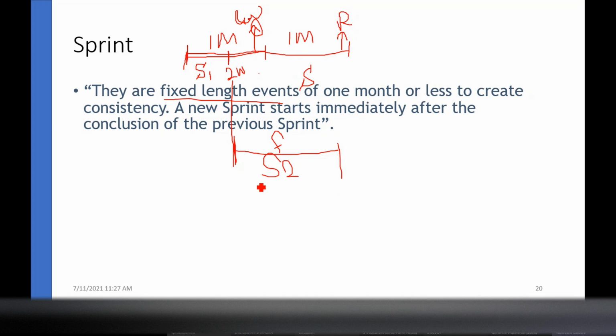and we can start again and give another delivery date. If there's no sprint, we have promised to complete within 1 month. Then our customer modifies the requirement within 2 weeks, and the new requirement should be completed within those 2 weeks. That's another risk. Since we are using sprints, we can inform the customer that our previous sprint is completed.